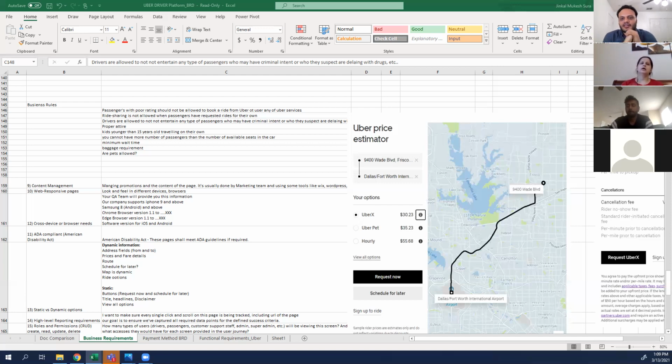Right? And one more question. Any app, like the mobile app, Uber app, anything can be created in Agile? Anything can be created, yes. It will be just that you're creating one screen at a time. Anything you can create in Agile and anything you can create in waterfall, both have their advantages and disadvantages. We're going to cover them in detail tomorrow. But at a high level, if you have 100 screens in Uber, you'll probably just prioritize 20 screens and make sure those 20 screens go live first and the remaining 80 screens can come after every 2 weeks. But in waterfall, you'll go live with all 100 screens at once.